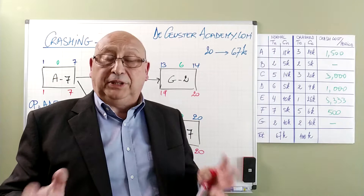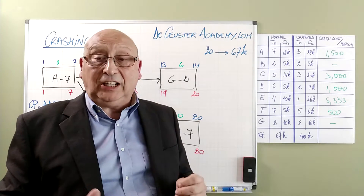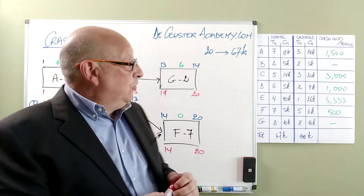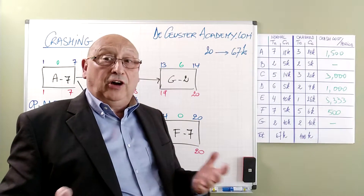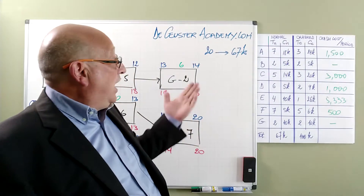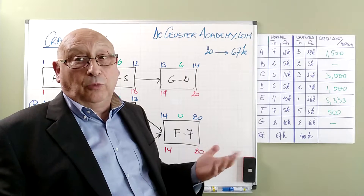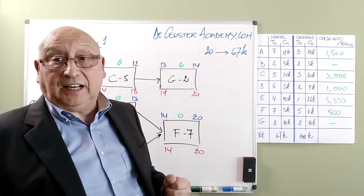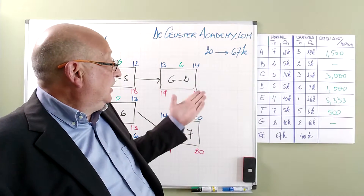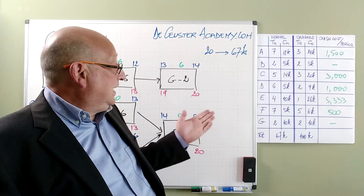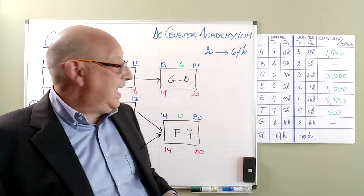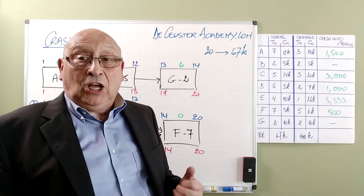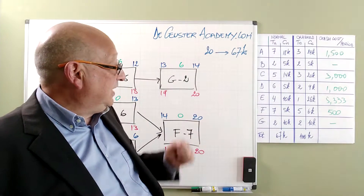In the second part of the presentations related to crashing, we are going to apply crashing to the network schedule. In the table you can see the result of our crashing calculations. Activity A has a crash cost per period of 1.5K. B and G are not crashable. C has a crash cost of 3K, D of 1K, E of 5.3K, and F of 0.5K. We can see that F is the cheapest activity to crash.